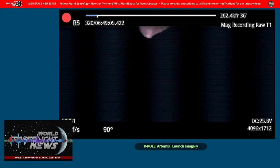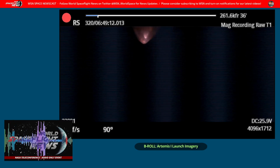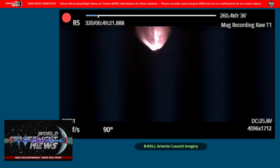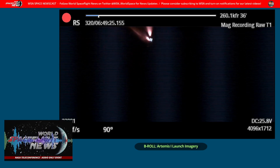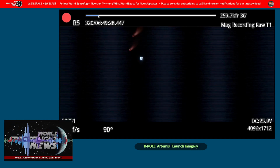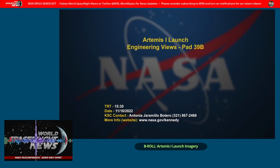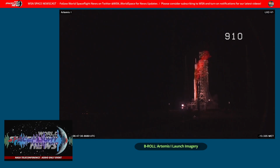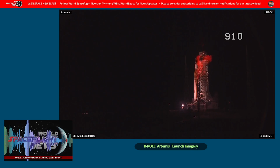So those two milestones are ahead of us, in addition to the tech development that has to occur for Starship. And then we have to have our suits developed for the exploration on the surface. We're down a path with our contractor for those surface suits. That's Axiom. They've stepped off and have hit some of the certification reviews they've had for development, but obviously we have a ways to go for that. So our plan has always been 12 months, but there are significant developments that have to occur, and that's just the nature of trying to land people on the moon. So we're still sticking with that 12 months, but we're always looking at the development of all the hardware that has to come together for that.